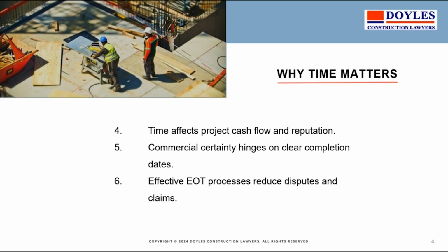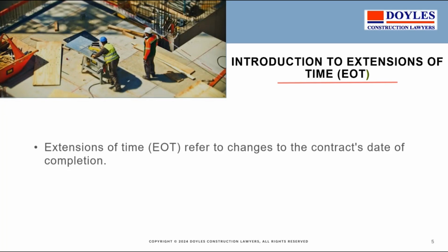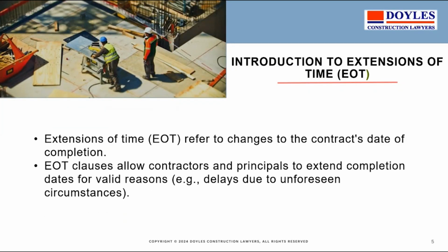Time matters, affects project cash flow and reputation, commercial certainty, and effective EOT processes make it easier for people to look to. So extensions of time, they refer to changes in the contract's date of completion, and you've got to distinguish between the date for practical completion and the date of practical completion, one being the target that's set in the contract and the other being the actual achievement of practical completion.